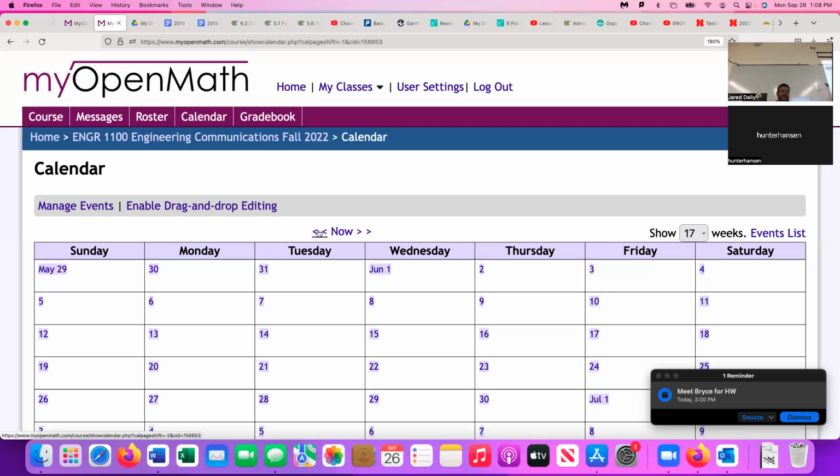preliminary design. You probably want to set aside some time for a task to do some deciding on which design is best. So maybe you'll put together 3 preliminary designs, and then you're going to spend some time evaluating the designs and figuring out which design is best for your project, or whatever. These kinds of very general tasks are what you want to do. You don't want to have any task on your task list that requires you to do any design first. You want to just have tasks that are going to have to be done.